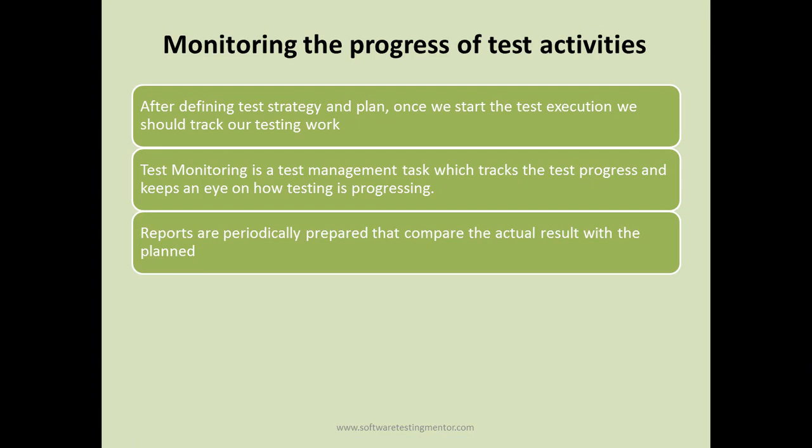Then reports are periodically prepared that compare the actual result with the plan. So in test monitoring, continuous reports are generated which compare the plan with the actual so that you can find out if there are any deviations from planned versus actual result.